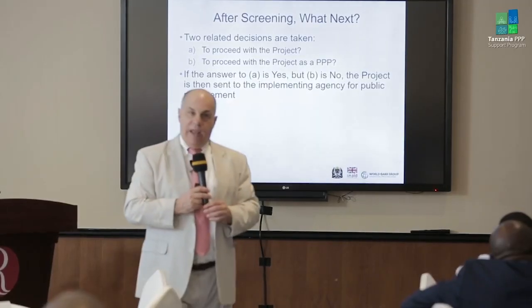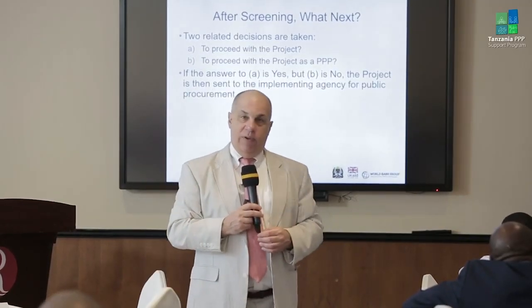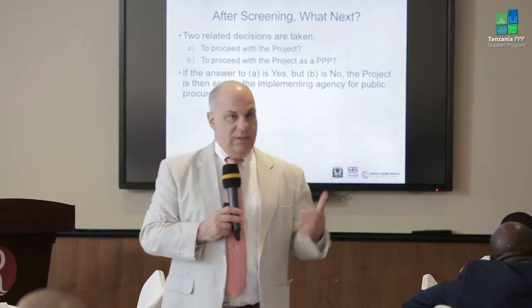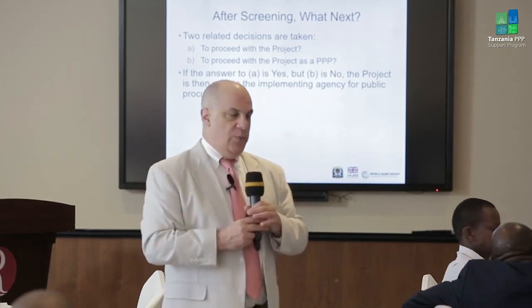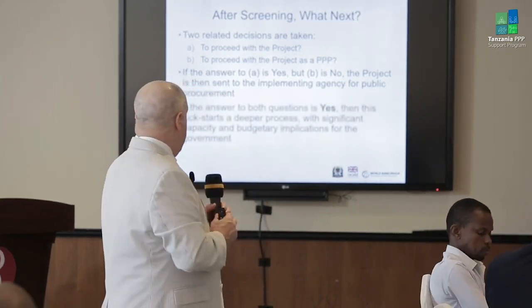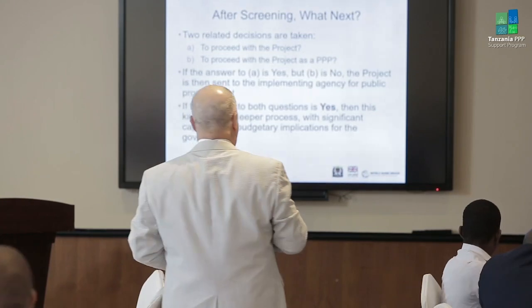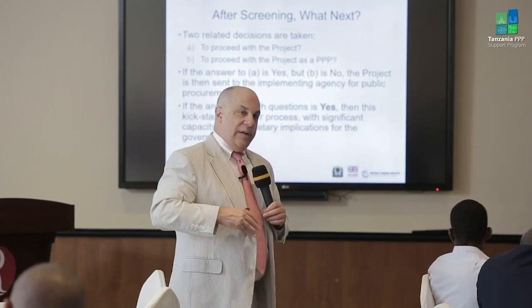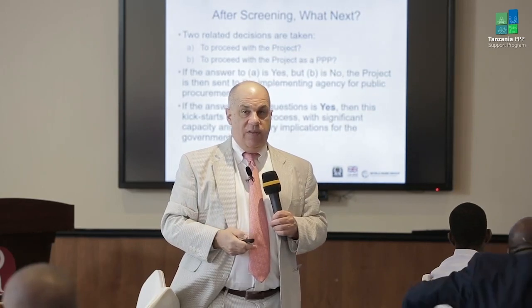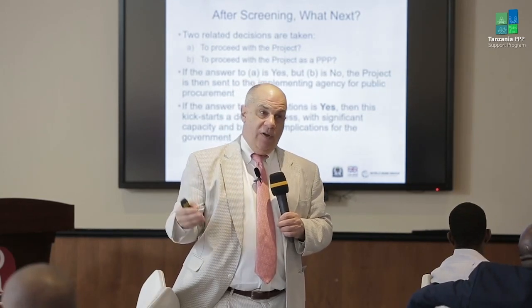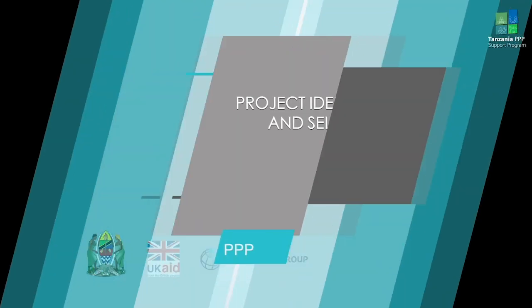So if it doesn't seem to be suitable as a public-private partnership, then it should be financed through traditional public financial means. Like I said, it doesn't mean it's a bad project, and the need might be so genuine that you should move forward anyway. If it can be done as a public-private partnership, this is what's going to launch us into a deeper feasibility study of the project and preparing it for actual procurement.